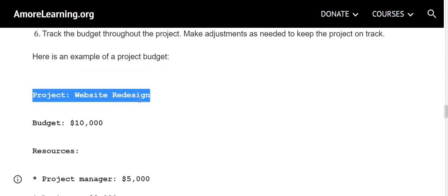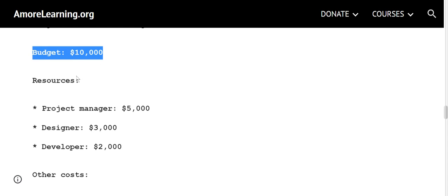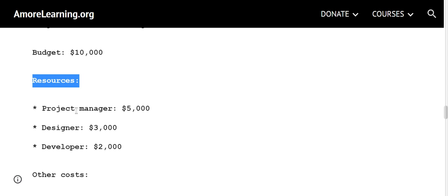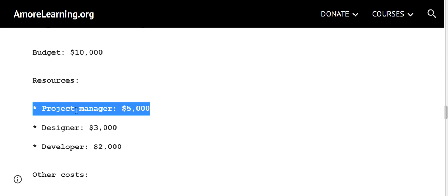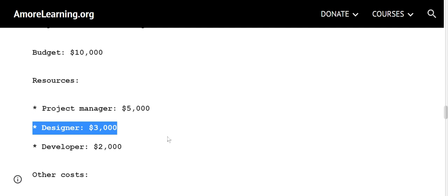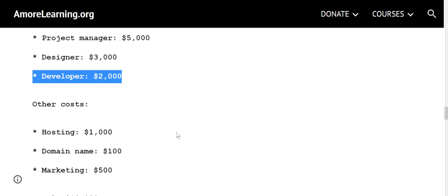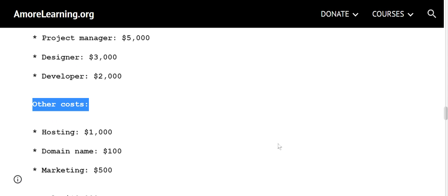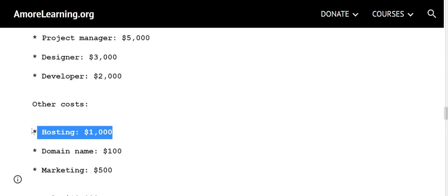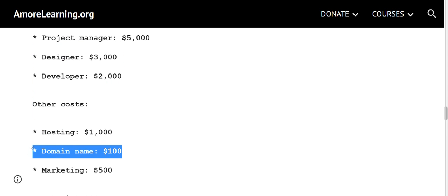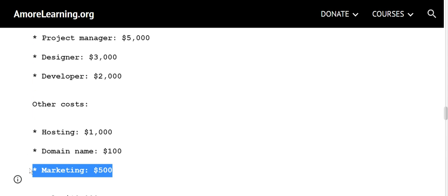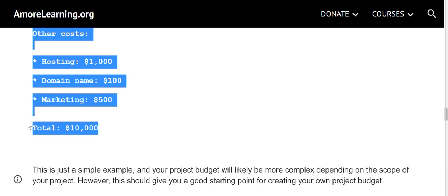Project: Website redesign. Budget: $10,000. Resources: project manager, $5,000; designer, $3,000; developer, $2,000. Other costs: hosting, $1,000; domain name, $100; marketing, $500. Total: $10,000.